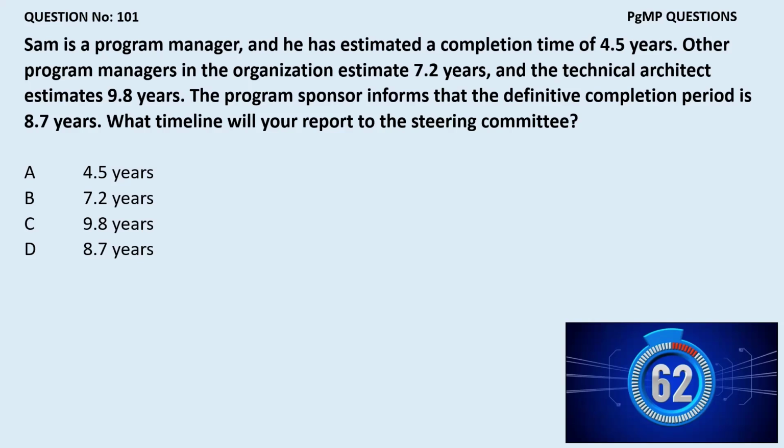Because you will find out these problems once you have crossed the program boundary. So the program manager is not crossing the program boundary. Whoever is making the new potential initiation of business case can be, for example, I develop a hydropower plant. I have 2 years of warranty. Within the 2 years, I am taking care of that. After 4 years, the client finds out that they need 2 battery banks instead of 1 because of the reliability issue. So in order to sustain this benefit, they will start a new program to install new battery banks. So this is the meaning of this.